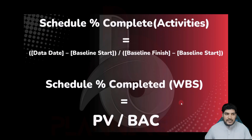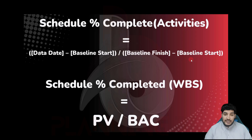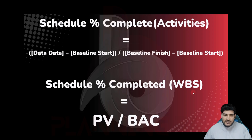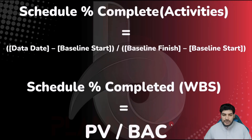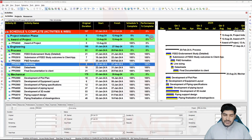For the activities, the formula for schedule percent complete is: (Data Date minus Baseline Start) divided by (Baseline Finish minus Baseline Start). You can create this formula in Excel as well, but in Primavera it is automatically calculated. For the schedule percent complete at the WBS level, it equals Planned Value divided by Budget at Completion. For performance percent complete there is also a different formula, but for clarity I have written only one formula here.